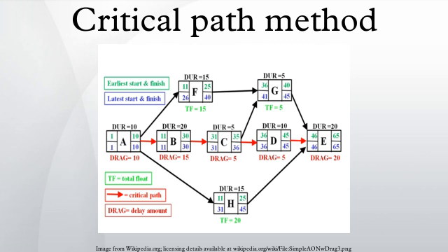or non-critical path. CPM analysis tools allow a user to select a logical endpoint in a project and quickly identify its longest series of dependent activities. These tools can display the critical path as a cascading waterfall that flows from the project start to the selected logical endpoint. Although the activity on arrow diagram is still used in a few places, it has generally been superseded by the activity on node diagram, where each activity is shown as a box or node and the arrows represent the logical relationships going from predecessor to successor, as shown here in the activity on node diagram.